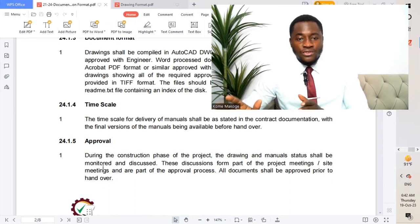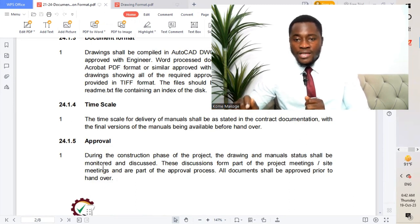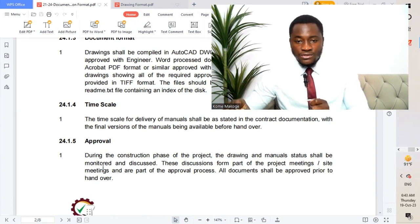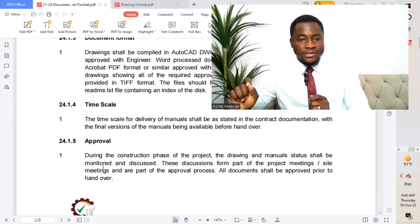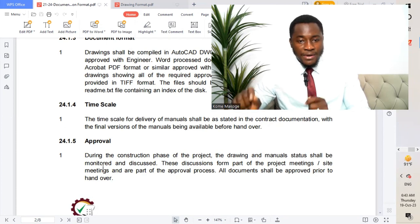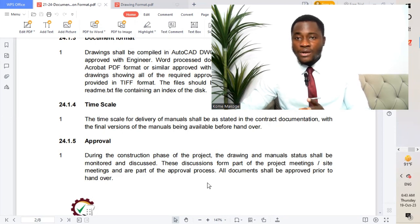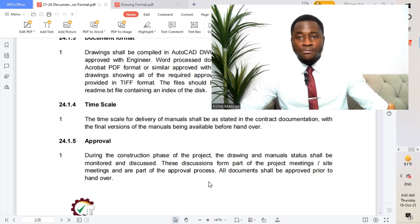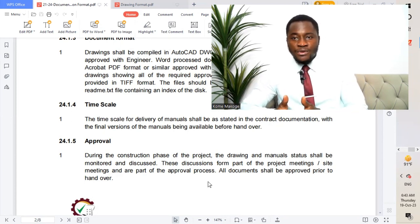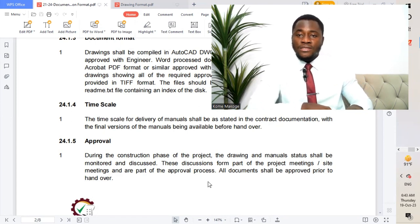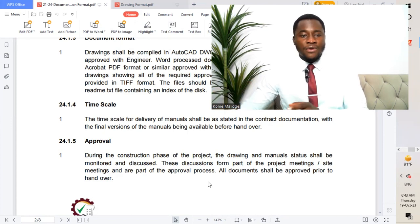Approval: during the construction phase of the project, the drawing and manual status shall be monitored and discussed. These discussions form part of the project meetings, site meetings, and are part of the approval process. All documents shall be approved prior to handover. So if we are preparing as-built drawings, we submit to the consultant on site and get approval before that set of drawings is given to the client for handover.